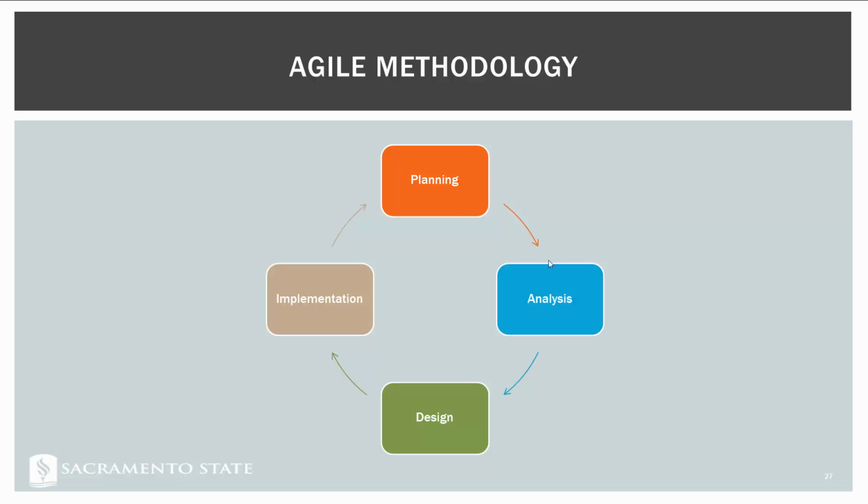And so one thing that's cool with Agile is if we go through these sprints, and every single cycle we can create or analyze, test, implement some functionality, and then the company or the group or whoever's using the project can start to gain benefit of this. And then over time, this grows and grows as features are added and added and added.